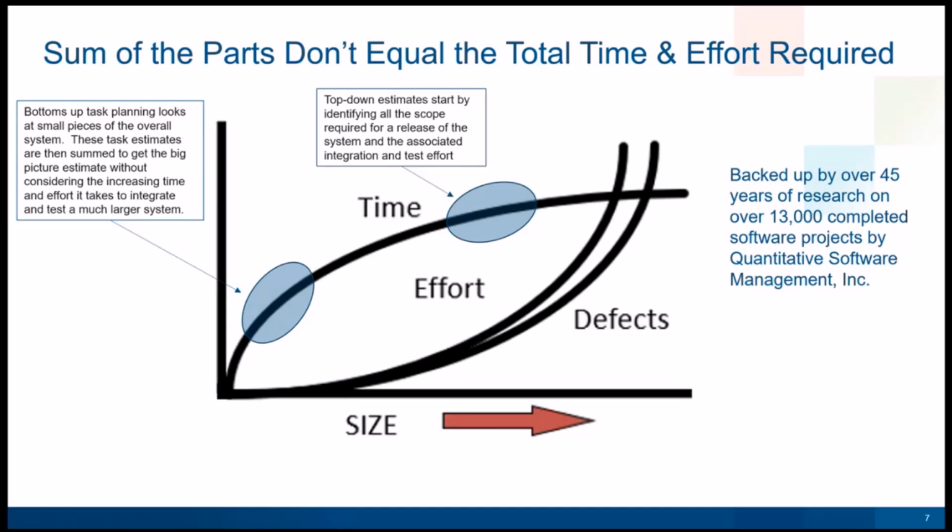That's the behavior. Now, when we're doing bottoms-up planning, we're usually working at the very detailed level. We're looking at individual tasks and how long they should take, how many people we're going to need over that timeline. And we're almost always working down in the small size regime. So our schedule estimates are always going to be on the lower side of things.